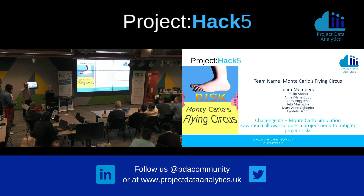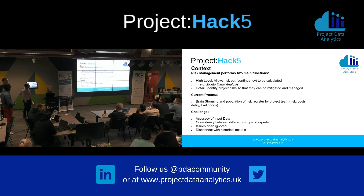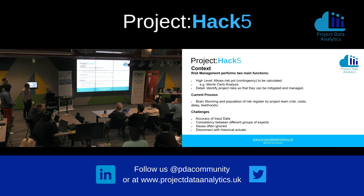We're Monte Carlo's Flying Circus, and we're looking at how much risk you need to set aside on a project. As a project manager, the two things I want to get out of the risk management process are: at a high level, how much risk pot do I need? If my project's 10 million pounds, do I need 500,000 pounds extra or a million? There are a number of ways of doing that, one of which is Monte Carlo analysis.